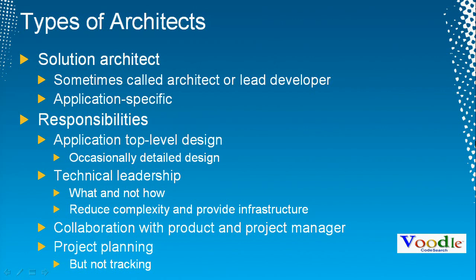The architect has to work with the product and project managers. And I had a whole day on this collaboration. All of Sunday was spent on this particular collaboration. The architect has to contribute to project planning, not tracking the project, but the architect is the only one to understand the dependency between the modules or the services, what is the critical path of integration, can estimate the effort involved, understand the risks, and help with the project plan. Absolutely.